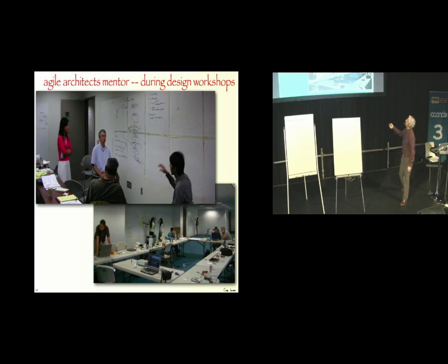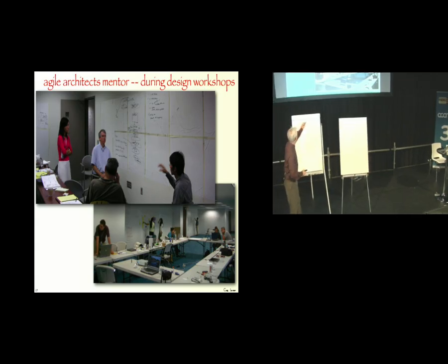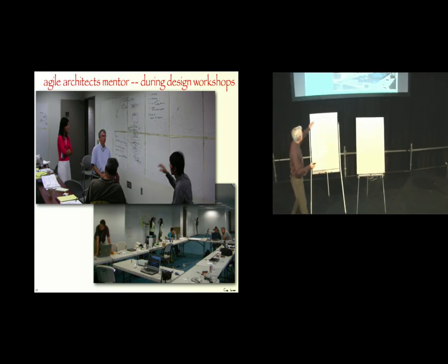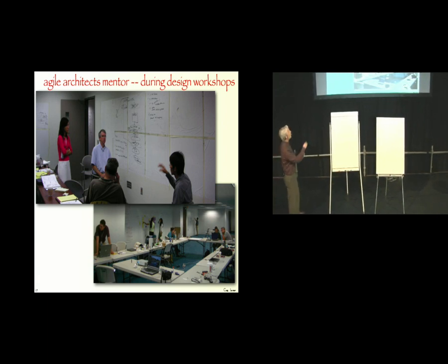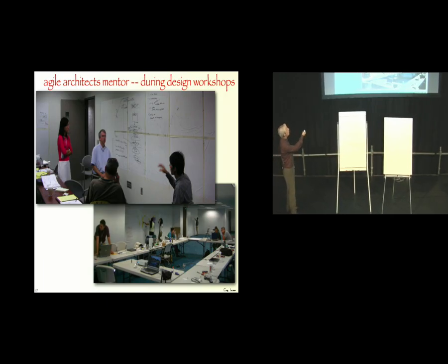And good agile architects mentor during design workshops. I encourage, every sprint in Scrum, suppose for example you're doing 3 items, item 1, item 2, item 3, that in between or shortly before each of these items, the team stands up and heads to their whiteboards. This is how I typically set up my team rooms: dining room table style near the center, the walls are free, and then the walls are covered in whiteboards. And then the teams, along with an architectural leader, can coach and discuss.